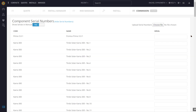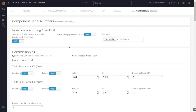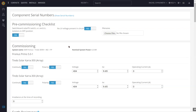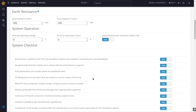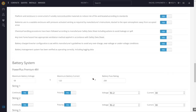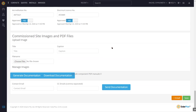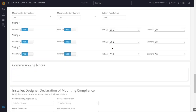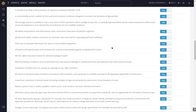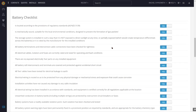Does it include the solar audit — meaning system commissioning? Yes. This is your commissioning page, which can be completed on site. You can enter serial numbers separately, and there's a commissioning checklist. You may want to add your own as a document to the system manual as well. I've completed this — it's specific to the system that you've designed. There are extra notes you can put in and you can identify the installer, the CEC installer, and the electrician who sign off on the job. If you scroll up, this also covers all the requirements of AS/NZS 5139 — the battery standard. All of the required checks for 5139 compliance are included, and that feeds into your handover manual.